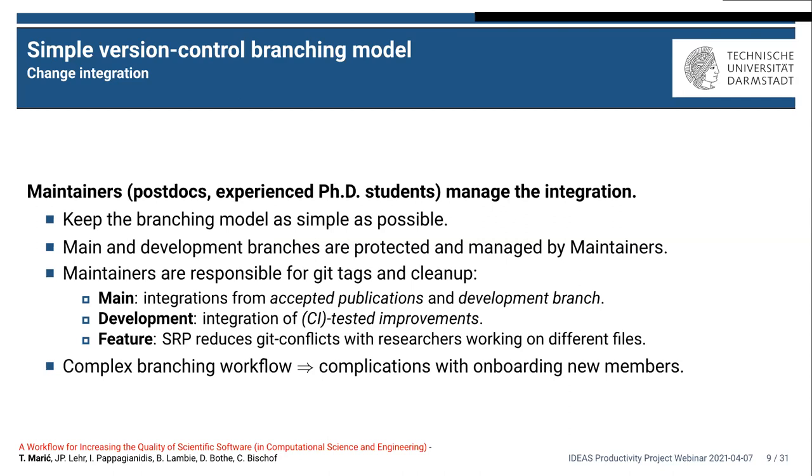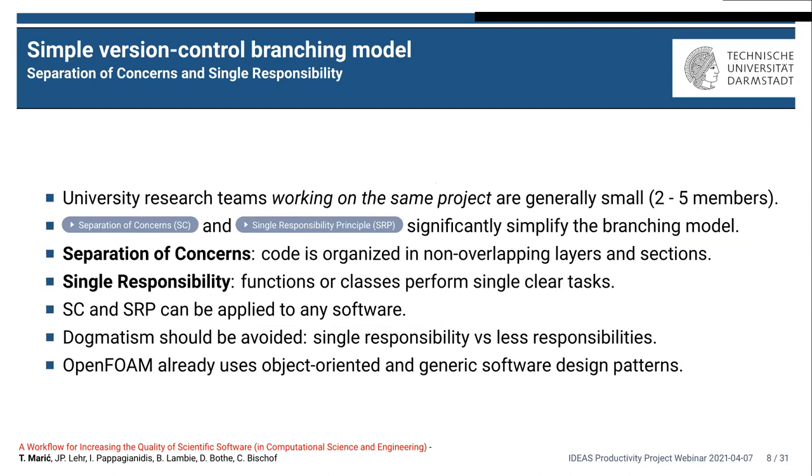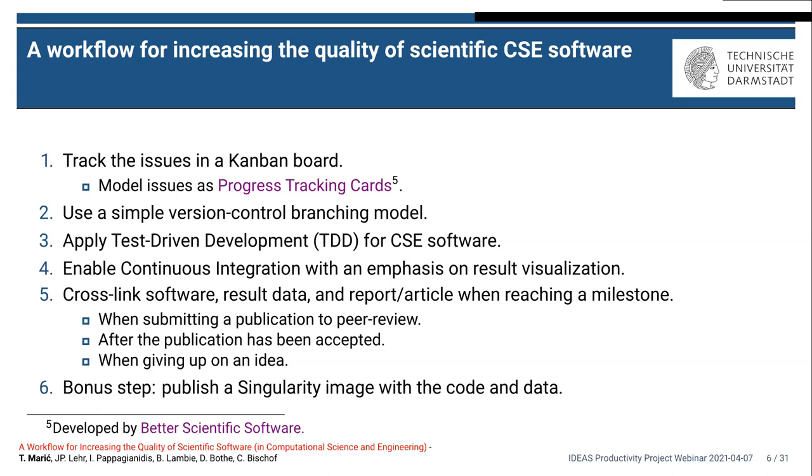And how to get them to use that, that's what I mentioned about the progress tracking cards. What we noticed is that if we use progress tracking cards, then people that work together on the same list of subtasks, when you put the people together, then the output is much, much greater. If you structure the project in terms of epics and stories and then leave each and every person to their own subtasks, then things don't get maintained. But this way, working in pairs or working like three to five people on these progress tracking cards, this makes a huge difference, at least from our perspective.